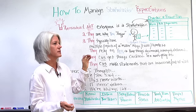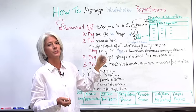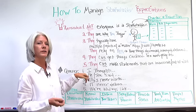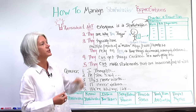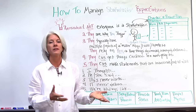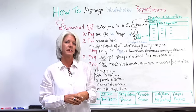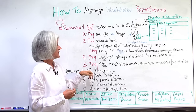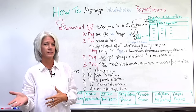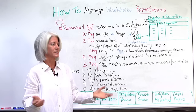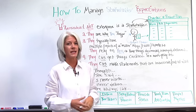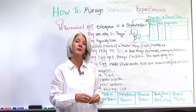I wanted to give these reminders because many times when things start happening during the course of a project, people run around with different myths or misinformation. So what are some of the cues that tip you off that expectations from your stakeholders are not being met? If you hear a stakeholder say things like: 'I thought this project was going to be delivered last month,' or 'I thought this person was going to deliver something,' or the 'he said/she said' comment, or 'this never works,' or 'IT never delivers,' or 'we're always late' — these are cues that somewhere there's a misalignment that you need to address as a project manager.